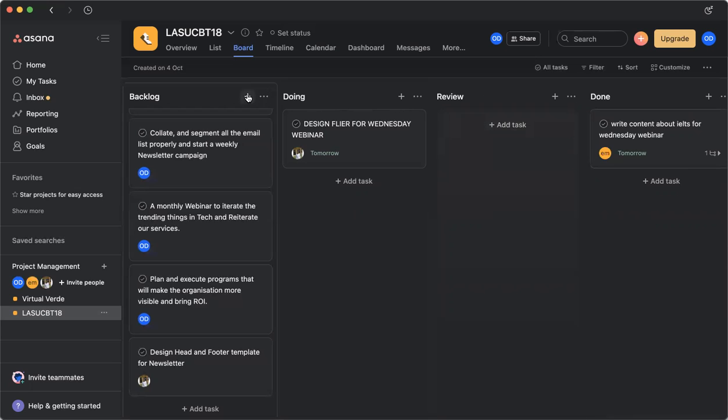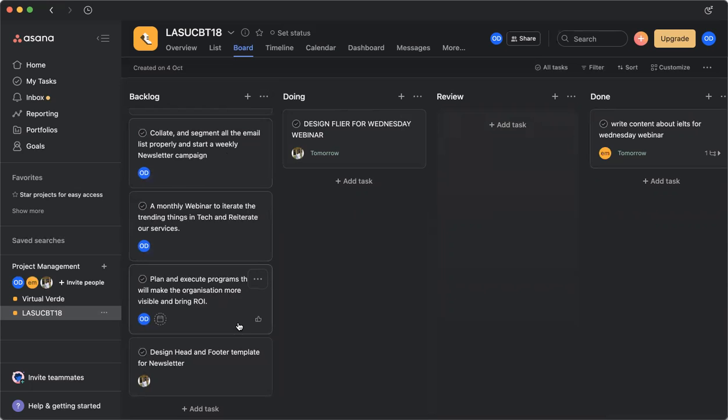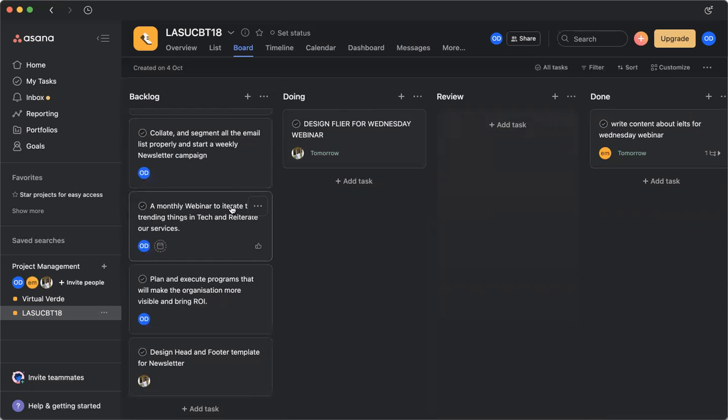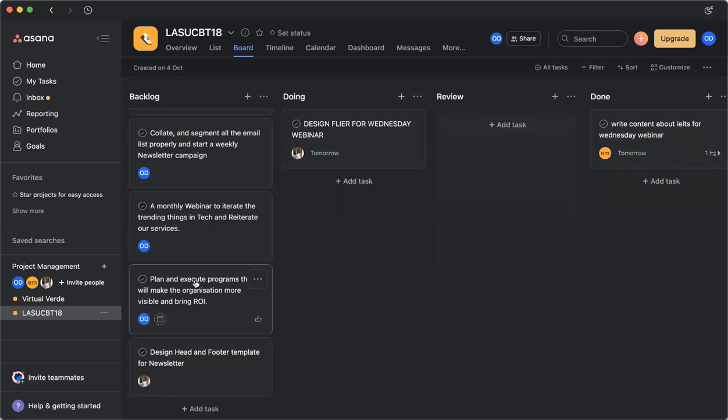So what I'm going to do is before we move a task to our backlog, I'm going to create another column where we can have, it's going to be our idea board. So when we have an idea, we just drop it there, everybody drop the idea there. Then once we've discussed about the idea and the idea is ready to be worked on, we move it to the backlog.